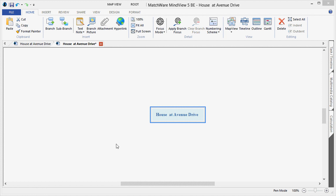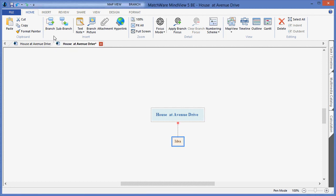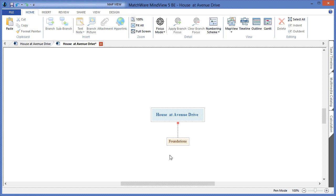Let's continue by creating our first main level or deliverable in the WBS. In this case, I will choose to create a branch and create that first level. In this case, the first level will be called Foundations.